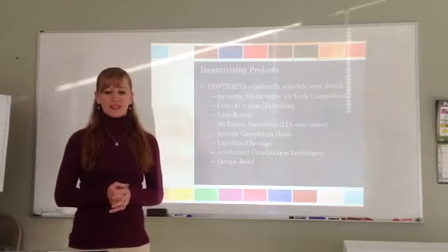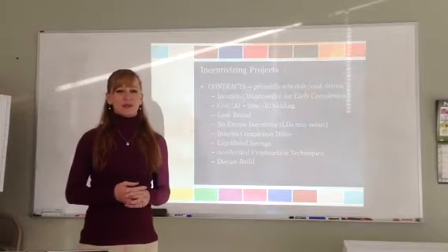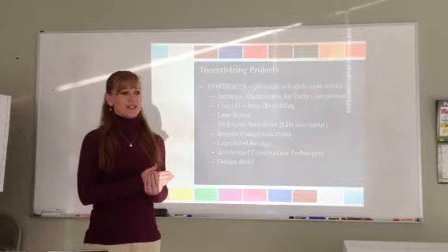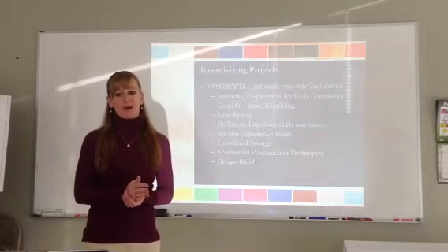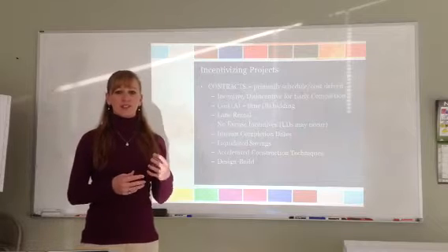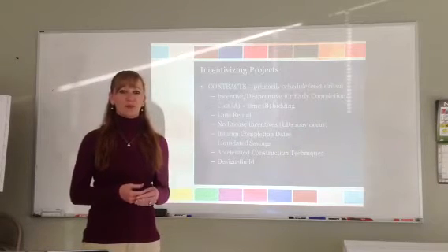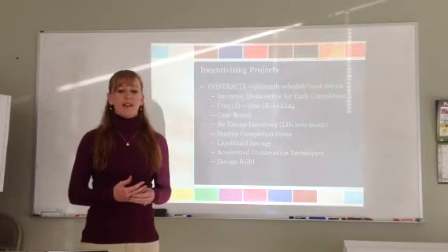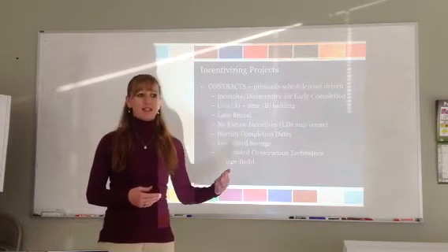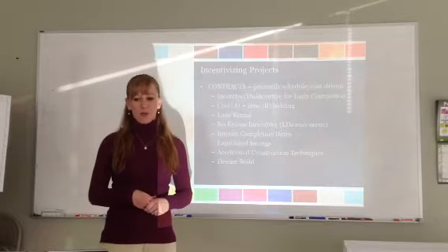There's a no excuse incentive. This means there's primarily a contracted date where there's a firm date we have to meet. For instance, the opening day for baseball. Liquidated damages may occur here. There's interim completion date contracts, which is more for phased projects, and that is making sure that the contractor meets those interim dates because those are important to the owner as well.